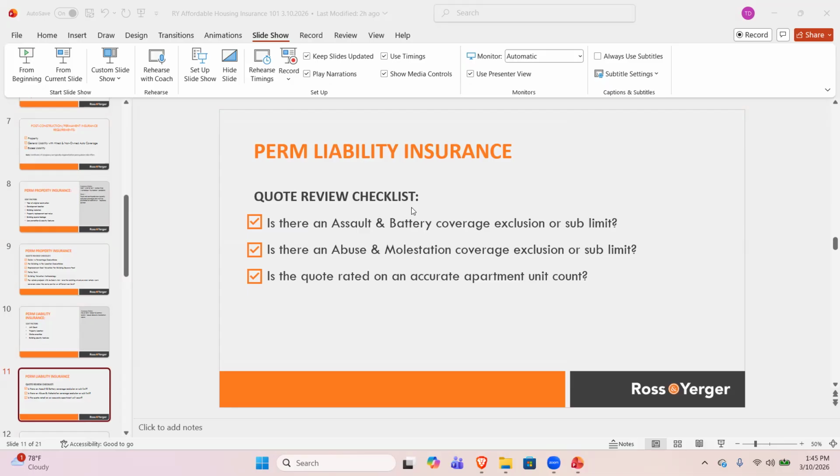The bigger comment here is to make sure that someone is looking at that, running a Marshall Swift valuation, or you have a pay application to go off of, because like I said earlier, our lender syndicator partners' traditional reaction is that they want to be extra conservative. They don't want to take any risk, so they want to see as high a replacement cost value as they're comfortable with, but it may be overinsured, and that doesn't do you any good. So there's a balancing act there. And that Marshall Swift gives us the industry averages for that location and the type of build it is, if it's frame or if it's masonry non-combustible.